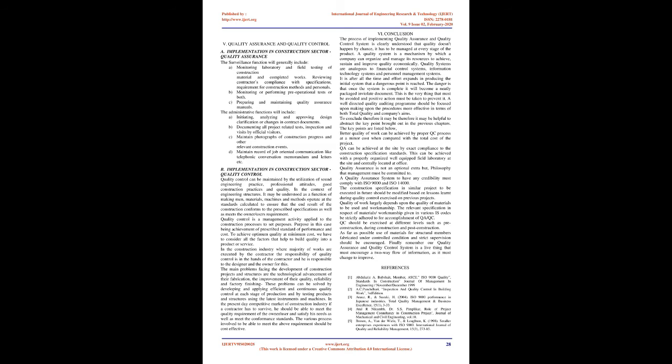5. Quality Assurance and Quality Control. A. Implementation in Construction Sector - Quality Assurance. The surveillance function will generally include: A) Monitoring laboratory and field testing of construction material and completed works. B) Reviewing contractors' compliance with specifications requirements for construction methods and personnel. C) Monitoring or performing pre-operational tests or both. D) Preparing and maintaining quality assurance manuals.